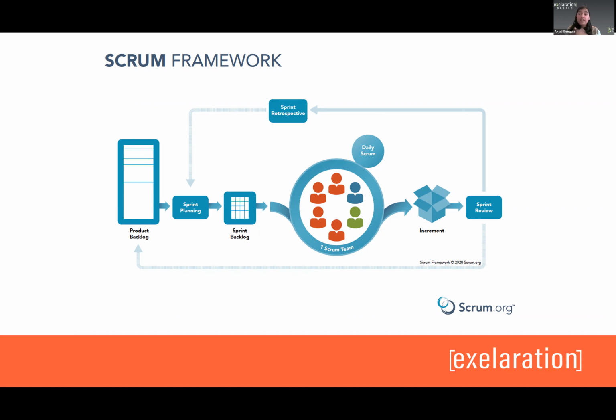And this is where that iterative approach starts to come in, because what you get from that feedback either goes into the product backlog, or it's not actually features that you want to come out of it, but it's also, hey, it was really tough to get in touch with our stakeholders this sprint. Can we come up with a better way? And those are the kinds of conversations you have in a sprint retrospective. So the sprint retrospective is something that should be done at the end of every sprint to discuss how the sprint went and get feedback.